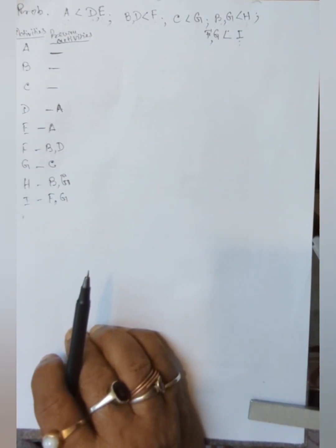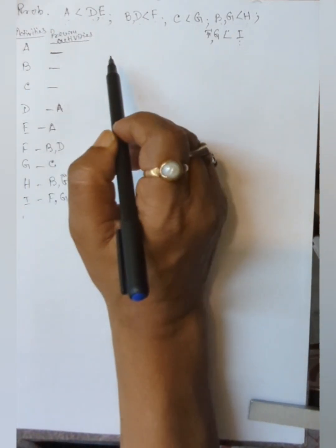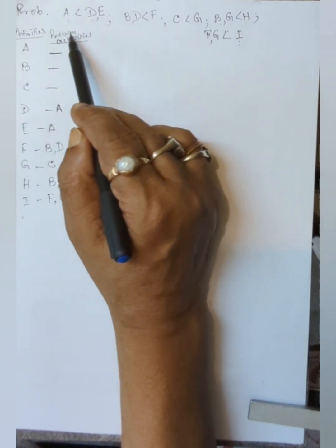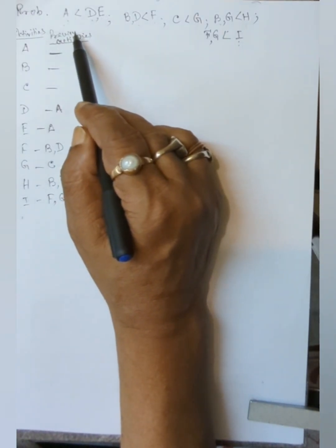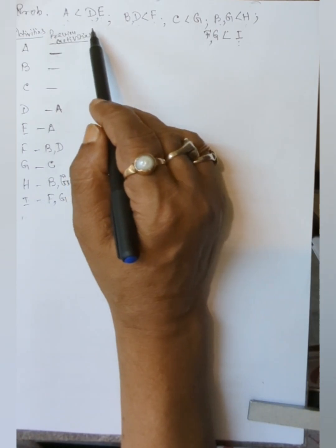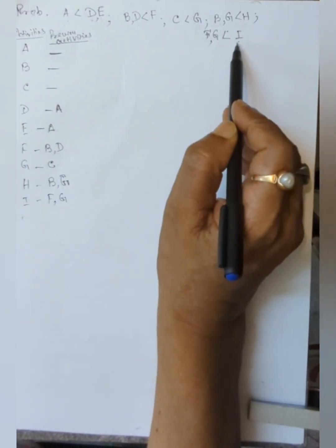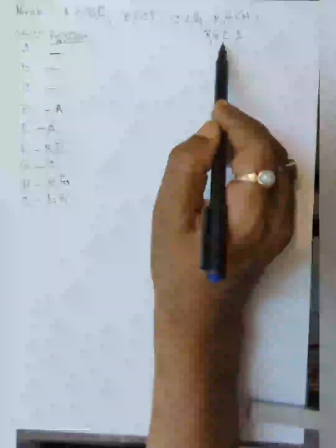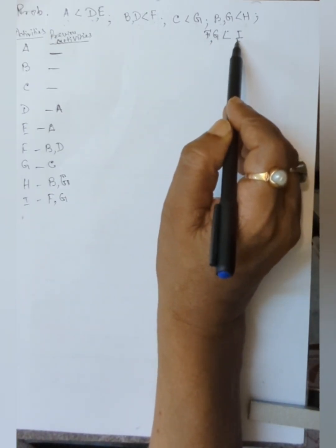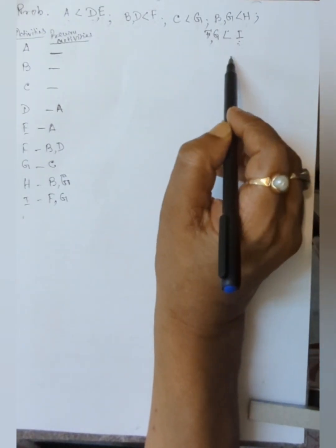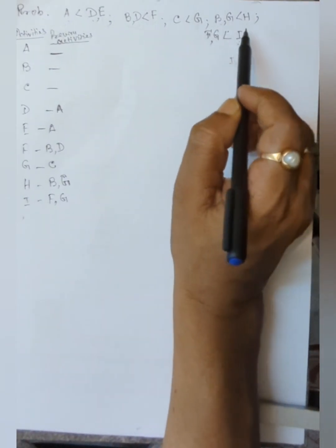So what you will do, I will draw. One thing again: you can check whether an activity is not a predecessor of any other, meaning no other activity requires it to be completed first. Then you can say that is the terminal activity. Which are the terminal activities? Check I. I is not a previous activity, that means I is the terminal activity.